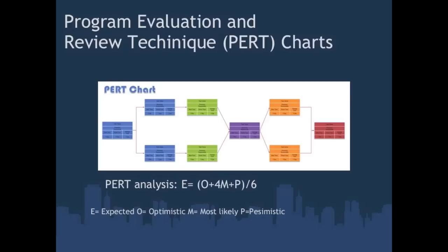This analysis involves the critical path method and the work breakdown structure to develop the timeline. When creating estimates for the PERT chart, it is also important to use expert judgment. This estimation tool uses 3 variables to derive E, the expected activity duration. O is optimistic, the activity duration based on analysis of the best case scenario for the activity. M is most likely, the duration of the activity given the resources likely to be assigned, their productivity, realistic expectations of availability for the activity, dependencies on other participants, and interruptions. P is pessimistic, the activity duration based on analysis of the worst case scenario for the activity.